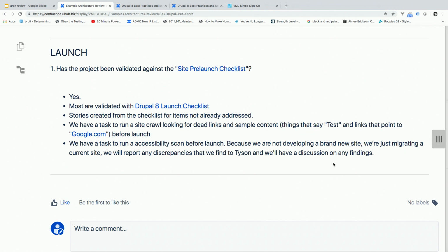Because this is 6 months later from when we're doing the architecture review. And that is basically what we do. So this whole thing goes out like 2 weeks before the architecture review is actually scheduled, and whoever is filling it out, we like to use the comments here to say, hey, keep track of this. I saw you talked about this. We're trying to get everything fixed before we actually go to the architecture review.